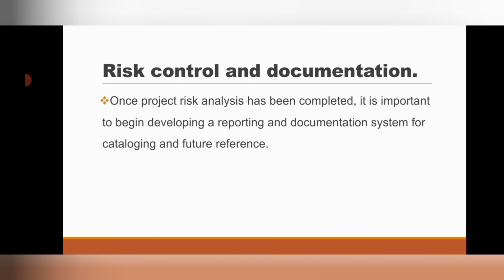And this is usually kept in the lessons learned reports. The lessons learned report keeps a record of every activity that happened during the project, including the risk register that was developed from the initial stage of the project. So when the risk register is available and documented together with the lessons learned reports, when similar activities are being undertaken in the future, it can be taken, observe what happened, and what necessary actions can be taken whenever a new project is being developed.